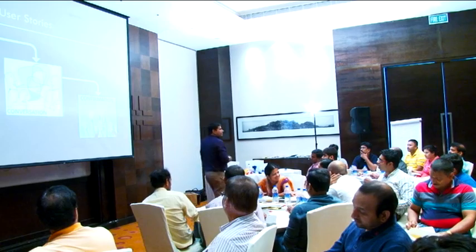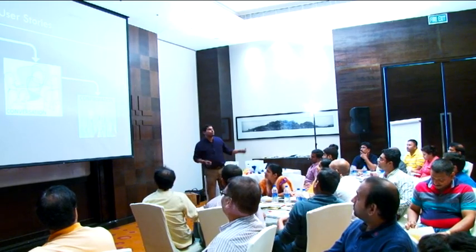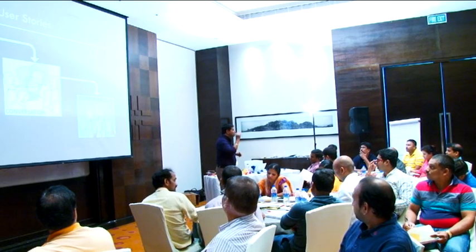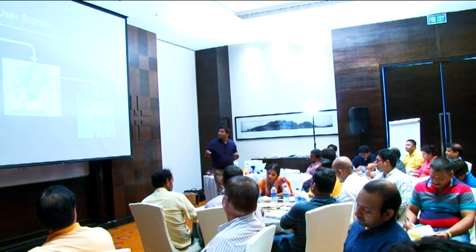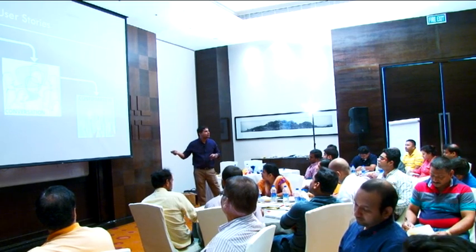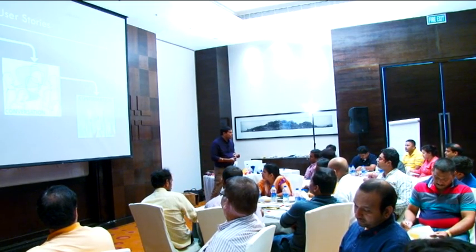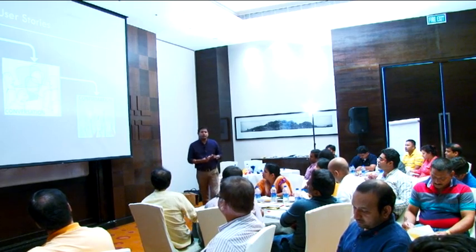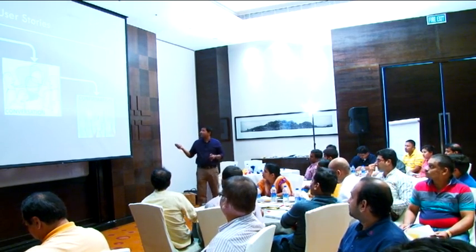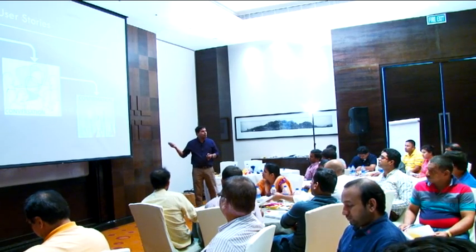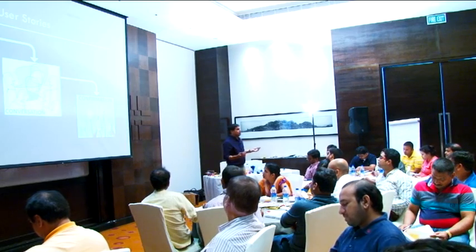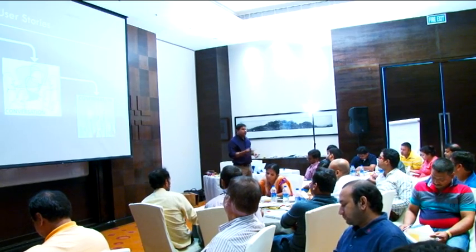That is where this card is just to place the further discussion. You put the story, actually driven by this conversation. Who are part of this conversation? Could be the product owner and the development team. They keep on discussing. Once they discuss, they agree on confirmation. What do you mean by confirmation? Acceptance criteria. Acceptance criteria, yes.